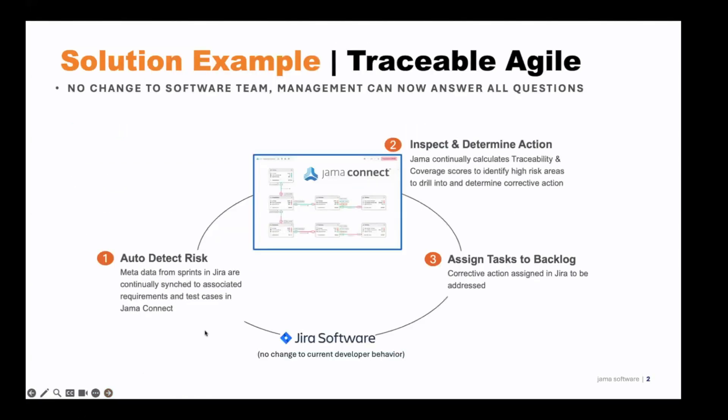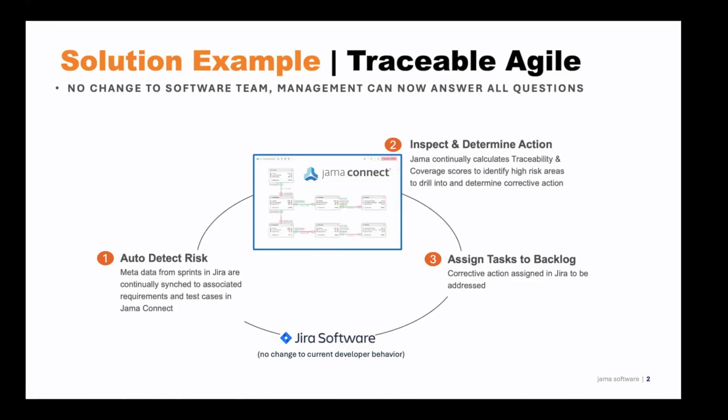How does traceable agile work? Here's an overview and diagram of Jama Connect maintaining the state of development activity in Jira providing the flow. Test activity continues as normal in Jira and risk is auto detected in Jama Connect by comparing all user stories and bugs in Jira to the expected development and test activity for each requirement in Jama Connect.